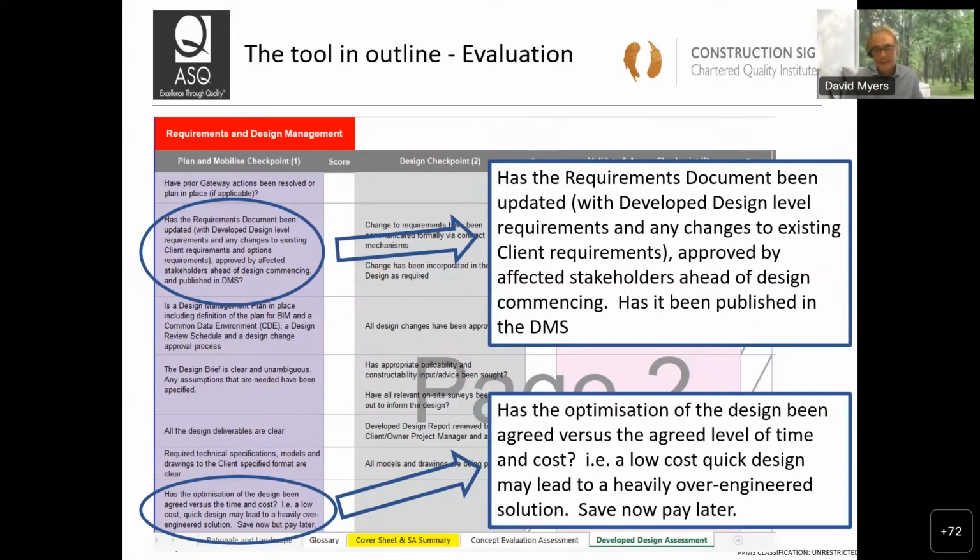They identified a lump called optimization of the design, and they just crossed that bit out, basically took the factor of design safety and multiplied it by 2, and it increased the weight of the design solution. So the client was going to pay later in tons of concrete and steel for a low-cost design.